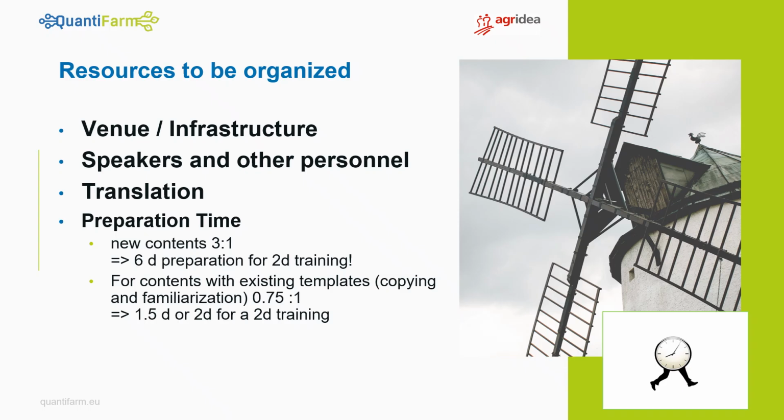But this preparation time can be cut shorter if we have already existing visuals or templates of them that we just need to copy and design, and that we just have to get familiarized with to be able to conduct the training. Then we can come down as far as 0.75 to 1. That means roughly 1.5 to 2 days preparation time for a 2-day training. That's already much less.